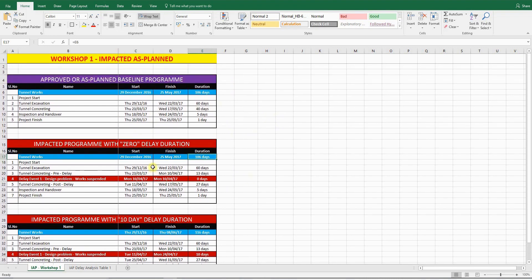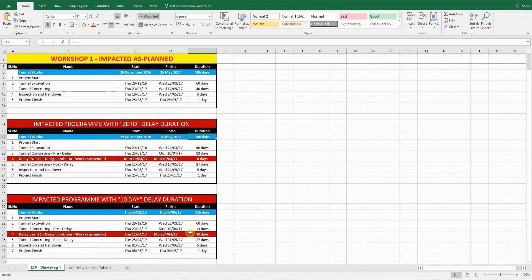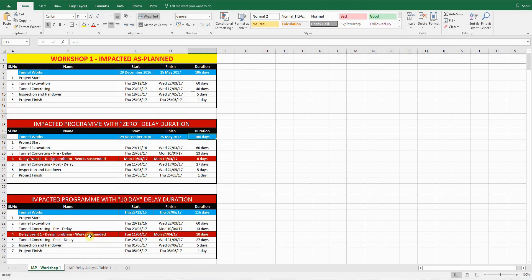This is extremely important, because if you disregard this step, and you directly impact the event, and put a duration of 10 days or 20 days based on how long it took, there may be some issues if you got the logic wrong, or if you linked something incorrectly. The whole analysis will just fall apart.